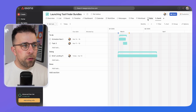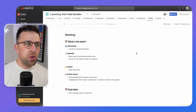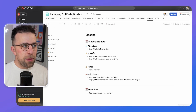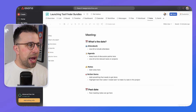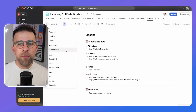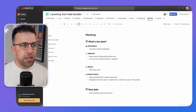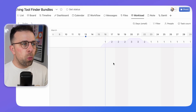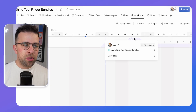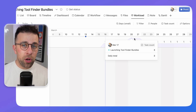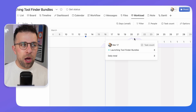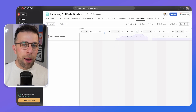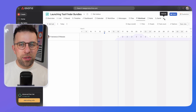There's a note view where you can add meeting notes or ideas in a collaborative environment shared with others, and you can create tasks and add formatting options — making it a partial documentation platform. There's also a workload view that shows how many tasks team members are working on, helping ensure nobody is overloaded on particular days, which is a helpful resource management function.